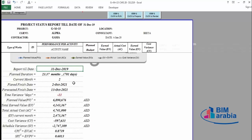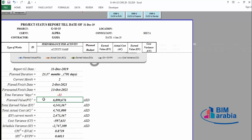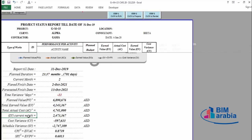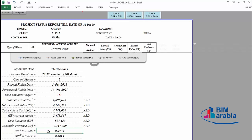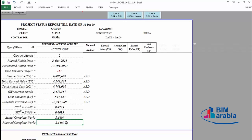All this information comes automatically. Here is the planned duration, current month (month two), planned finish date according to plan, forecasted finish date according to the delay that occurred, and the variance in days. Here is the planned value that should have been completed, the total earned value actually completed, and the actual cost expended. Also shown: the earned value for this month, the cost variance, the schedule variance, the CPI, the SPI, the actual completed work percentage, and the planned completed work percentage. This is your status report for today.